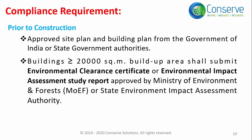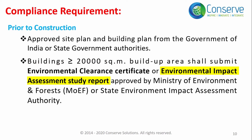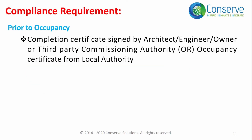In summary, requirements are classified into prior to construction and prior to occupancy. Prior to construction: approved site plan and building drawings, and if the project is 20,000 square meters or greater, an environmental impact assessment report or clearance from the environmental agency. Before occupancy: a completion certificate signed by the owner, architect, or commissioning authority, or a fit-to-occupy certificate from the local government agency.